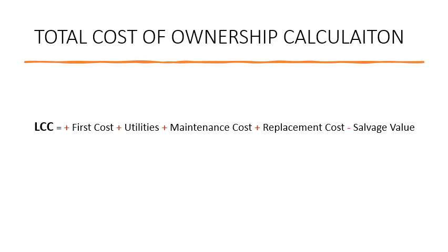And replacement is, for example, for those cases where the AC is broken and you need to change the whole system. And maybe replacement happens after 10 years or 15 years, and it's not something that you need to pay for frequently. And we have the salvage value, which is the amount of money that you can make by selling your building when you want to move out, and this way you have to deduct it from the LCC cost.